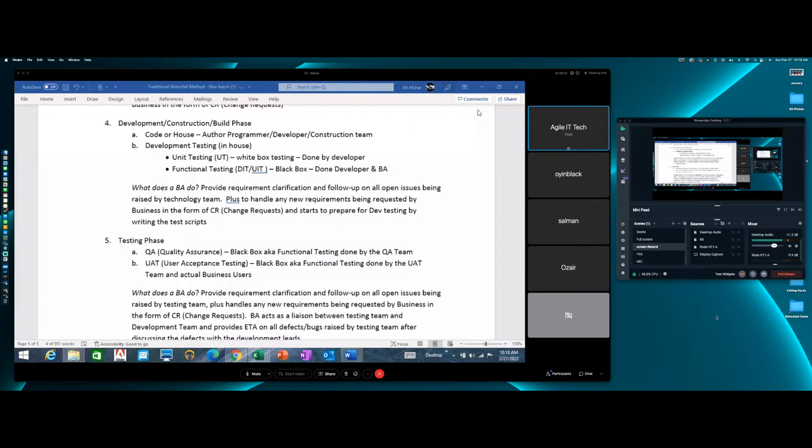Wednesday comes around, "Ozair, where's my code?" You should be asking him that. You understand? Ozair is like, "I'm still running into problems with this, with that." Listen, Ozair, I can wait till next Monday, but if I don't get the code base next Monday, I'm going to escalate this, or I'm going to let Ali know that we're delayed by a week.